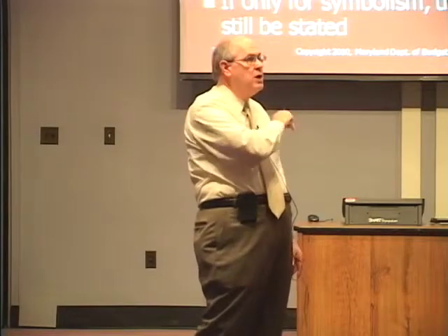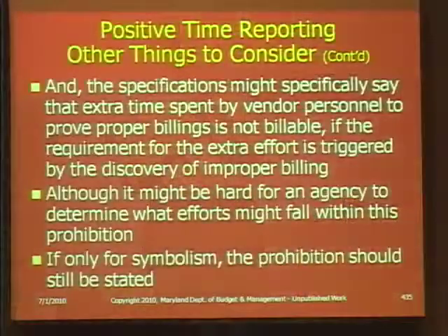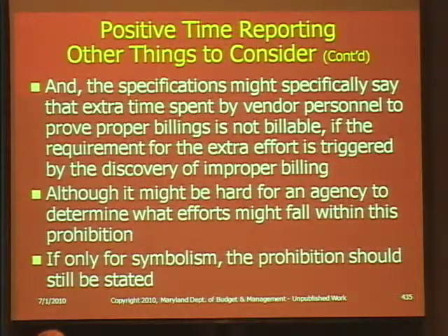That way you might be able to have your cake and eat it too, so to speak. Have the validation and not have to pay for it. And the specifications might specifically say what I just said, that extra time spent by the vendor personnel to prove proper billings is not billable if the requirement for the extra effort is triggered by the discovery of improper billing, although it might be hard for an agency to determine what efforts might fall within this prohibition. If only for symbolism, the prohibition should be stated.